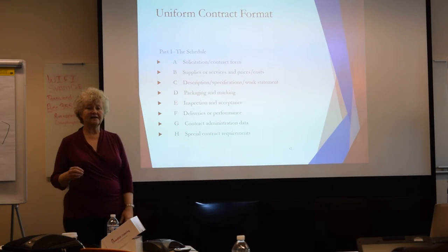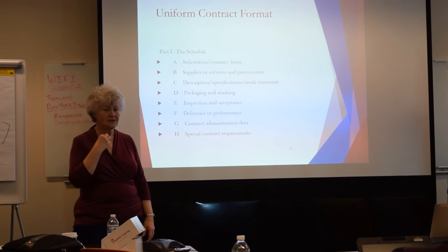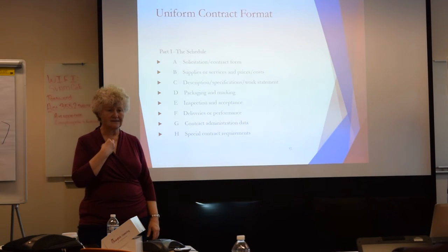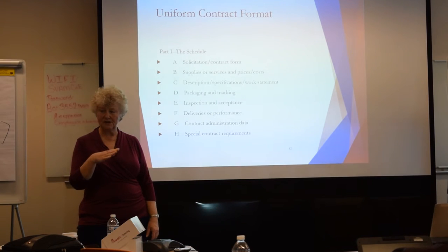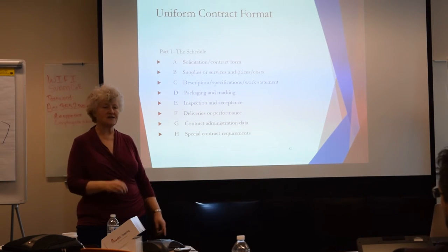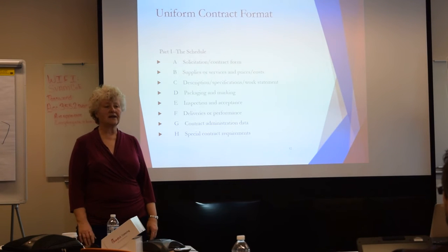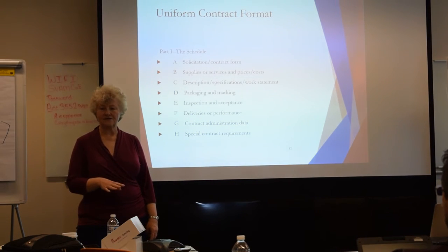Because, not that the government often does this, but they could accept your proposal as is, exactly the way you bid it the first time, and it's a done deal. You were contractually obligated to provide those products and services for the price that you stated. So this is one of those things where you have to get it right the first time.